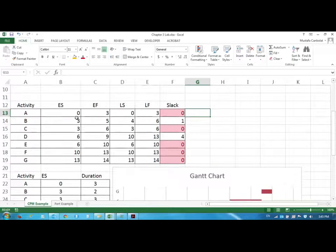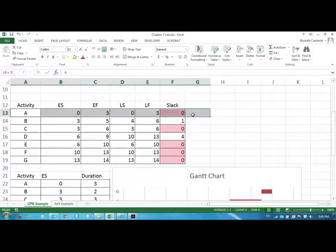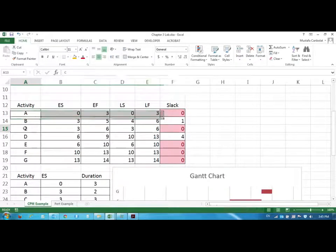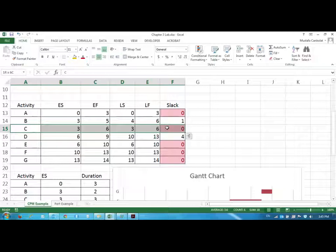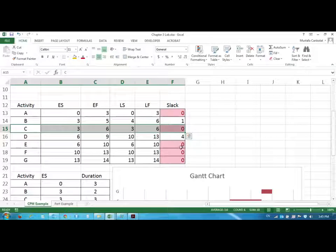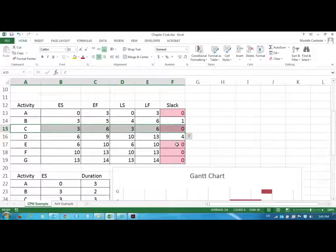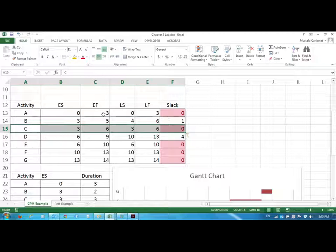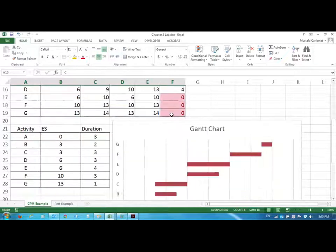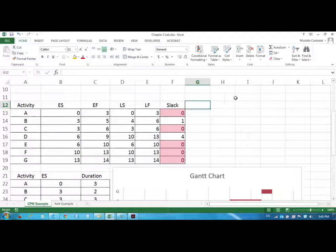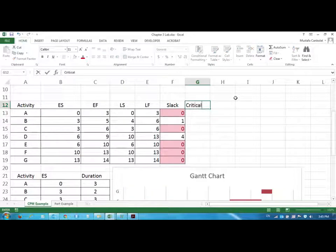That we call those activities as the critical activities. So the critical activities are the ones that we cannot delay. And B and D are not critical because they have slack. We have the flexibility. But the others have the B and D have the slack. But the others we cannot really do anything. We cannot change their time. They are rigid. They have to be completed by that time. Otherwise the project will get delayed.